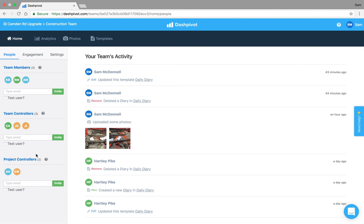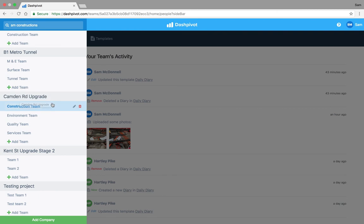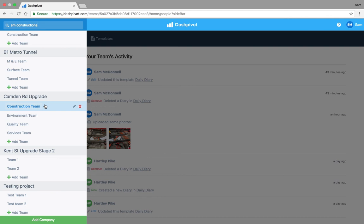The next level is project controllers. These are the people who have effectively the same controls as team controllers except across every team within a project. So in this case if I was a project controller for Camden Road upgrade, I've got the same permissions as a team controller but across all of these teams that have been set up.